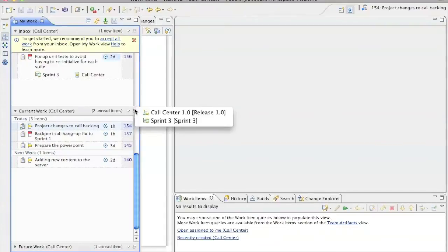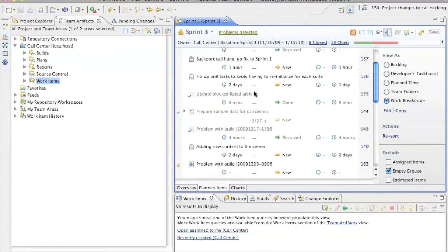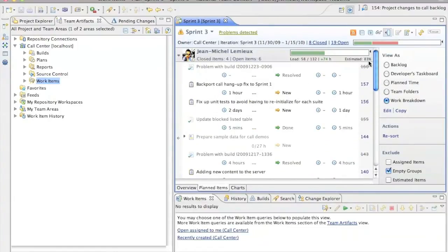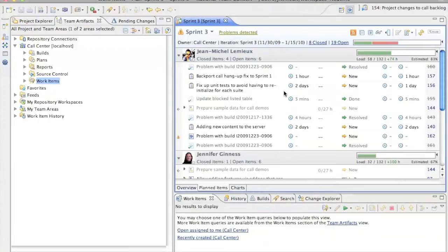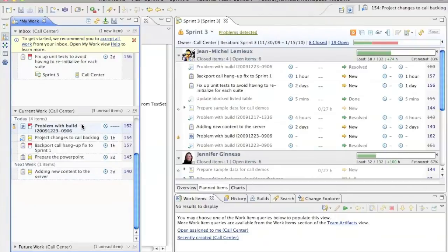This plan always links up to the team plans so that you can easily trace back to what as a team you've decided to do, and it makes it such that developers have a direct link into the team plans. In this case, you can see my open defects and stories for this iteration, and there's one for fixing the broken build. Here it is. Directly in the IDE, I'm going to mark it as high, provide an estimate, and re-rank it to the top of the list.